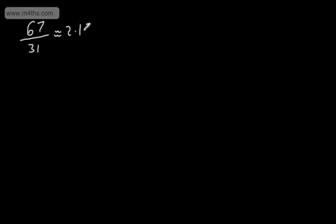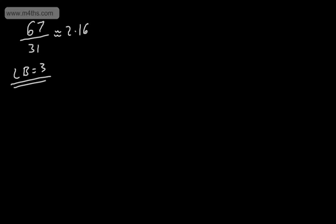In the last example, we had 67 time periods — that was the sum of all of the activities. We divided this by the critical time and it gave us approximately 2.16. This told me that the lower bound of workers required was 3. We round up to the next integer, so we couldn't complete the project in the critical time with less than 3 workers. Sometimes we'll be asked to complete the project with fewer workers than that lower bound, and clearly this is going to have a knock-on effect to the project time and also the activities starting on time. So let's look at an example of this.